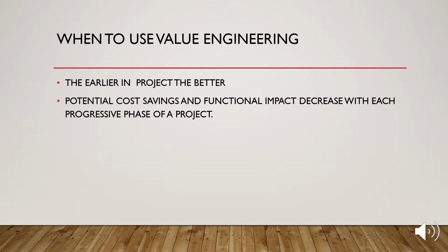So when should you use value engineering? Simply put, the earlier in the project, the better. The potential cost savings and functional impact of the value engineering process decrease with each progressive phase of the project. In the planning and analysis phase, the potential cost savings of the value engineering process are the largest. You can impact the path of the project, completely impact and change the design of the project.